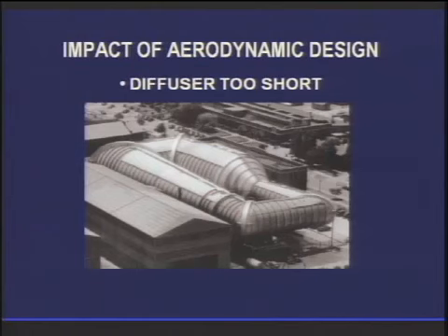But some guy, I don't know who he was, remember the motor was going to be in a separate building out here, and a long shaft running through the tunnel wall to a rotor mounted in the nacelle. He realized that if we mount the motor inside the nacelle, as it is with the 19-foot pressure tunnel, don't build this building, don't have this extra long shaft and all, the amount of money we'll save from doing that will offset the additional costs of removing this stuff and adding the insert. So that was good news.